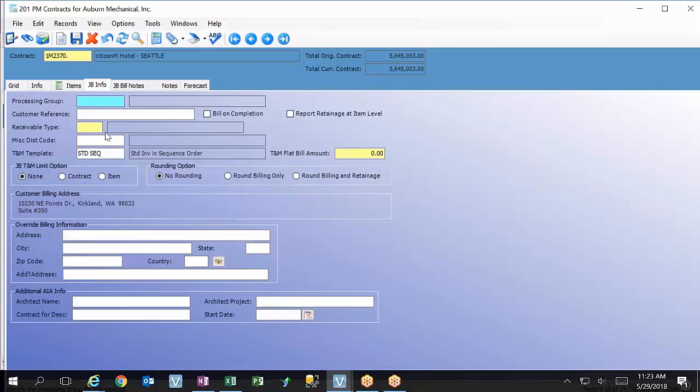But as far as doing a bill to the owner, no, I don't believe that's been produced. Okay, so we'll show the way I like to do it. I like to have the PMs fill in the form, like this is what I think we should bill, because they hopefully know. When it's done, they indicate that it's done, and then maybe accounting reviews it a little bit. Yeah, that's a piece we're still wanting to look at. Okay, so we'll take a look at that option.